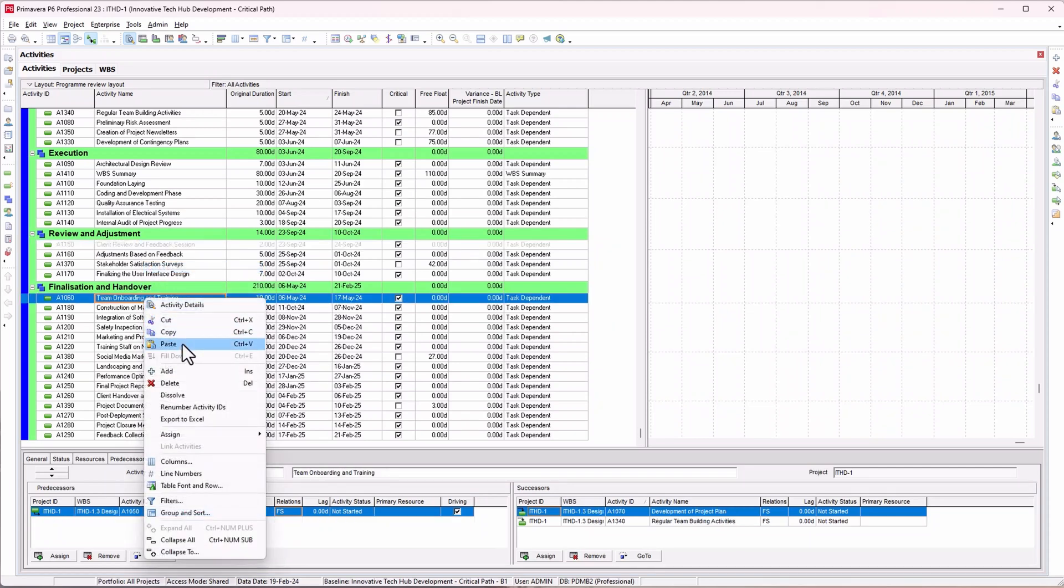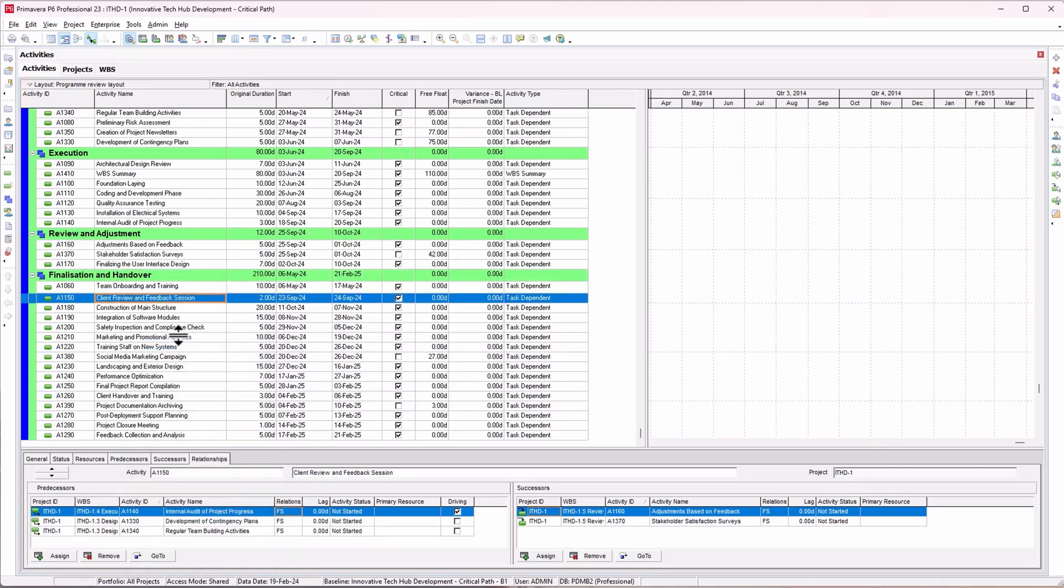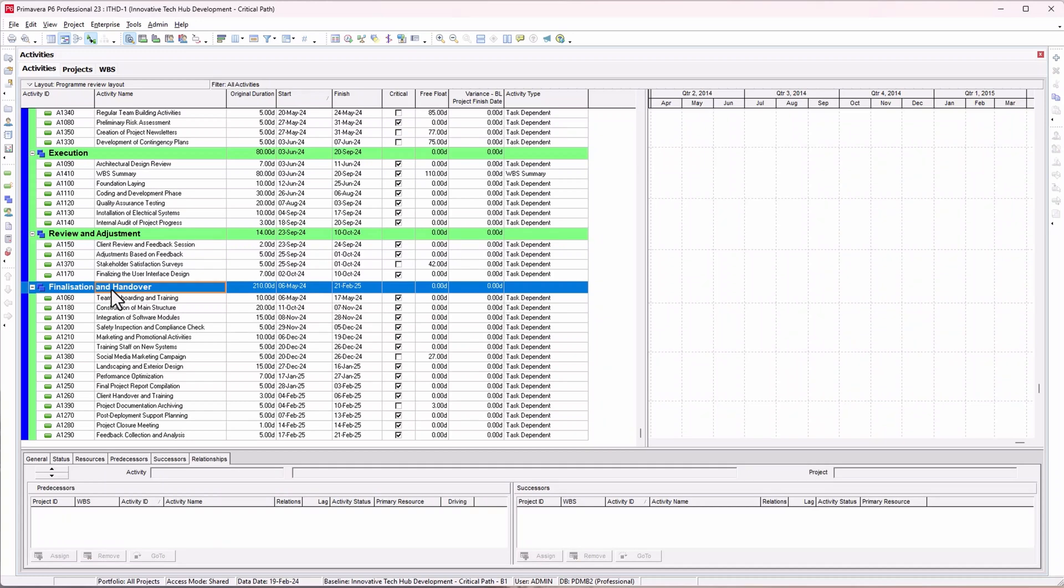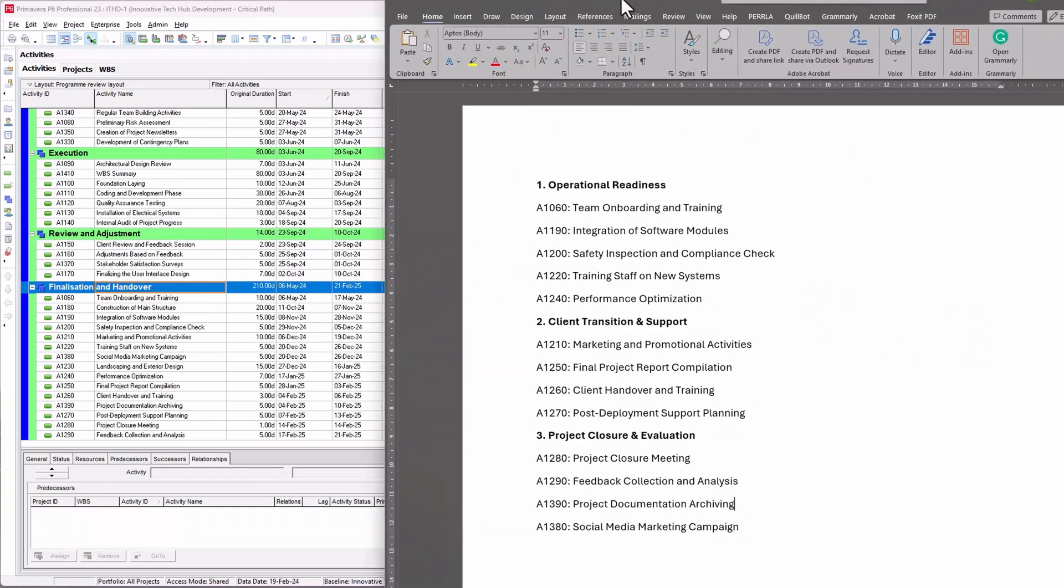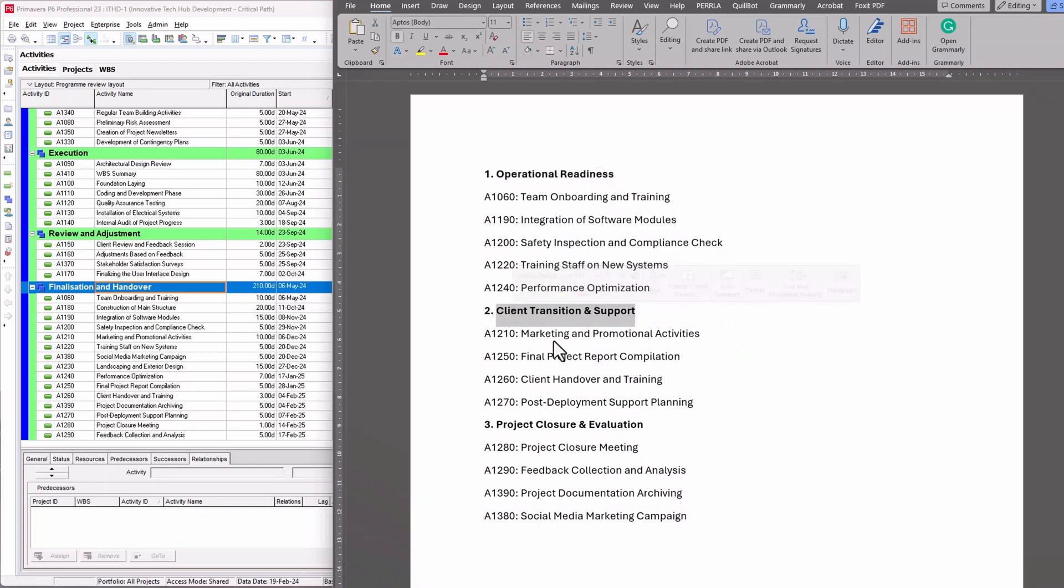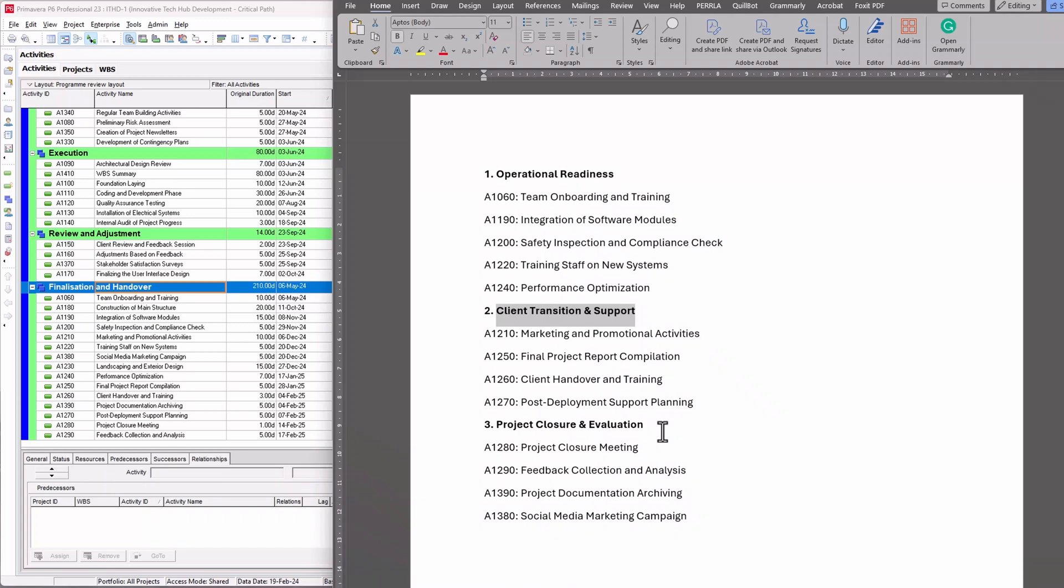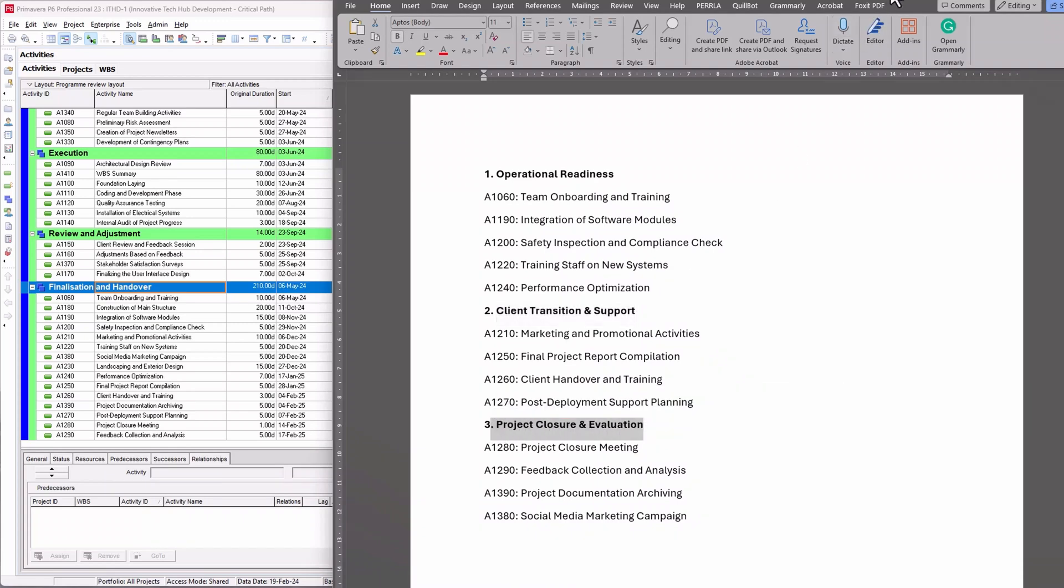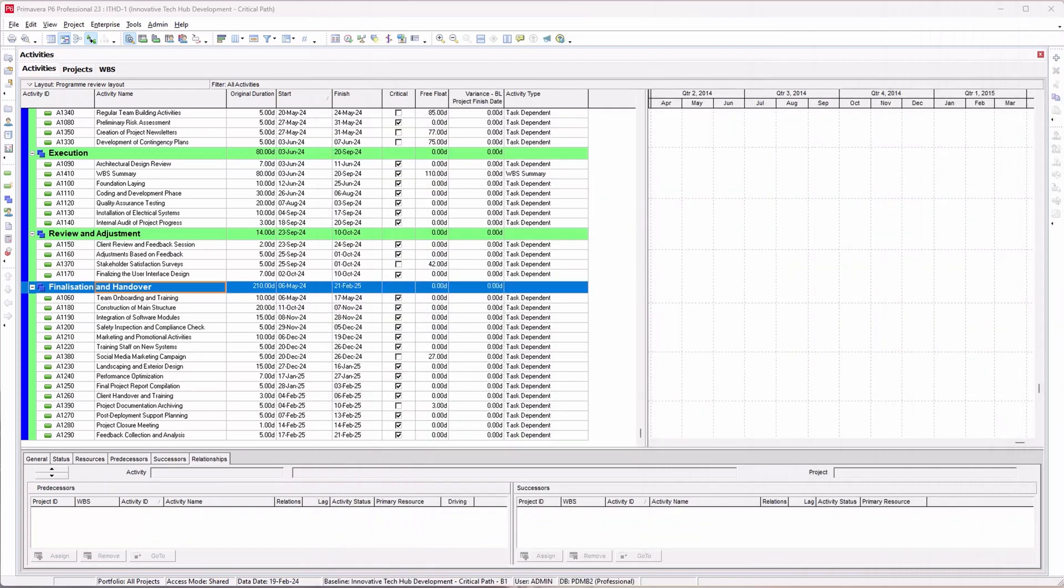Another exercise I'd like us to do: let's say our project manager has reviewed this program and said this finalization and handover activity should be split into three. We need to create a new WBS for operational readiness, another one for client transitional support, and a WBS for project closure and evaluation.